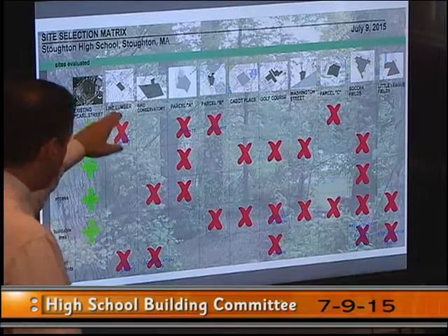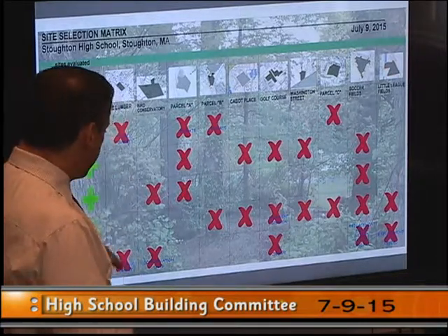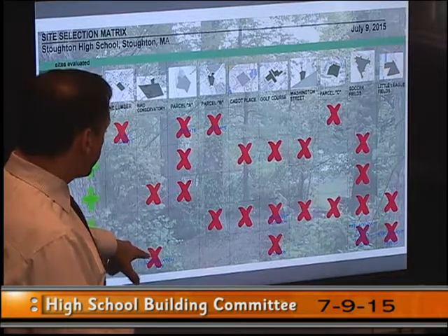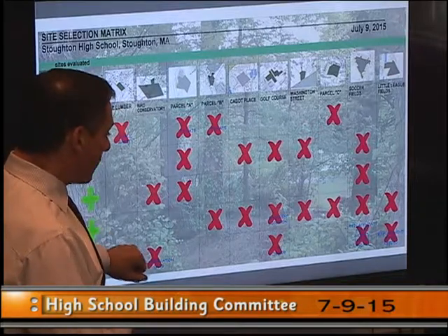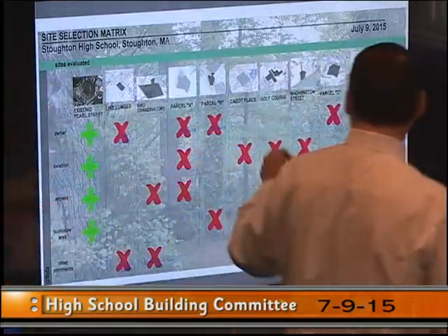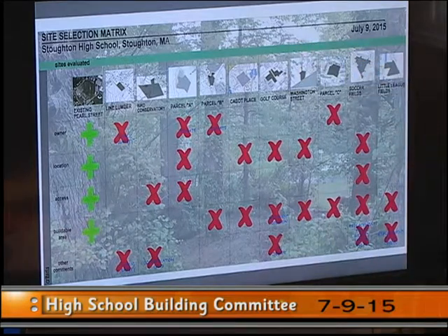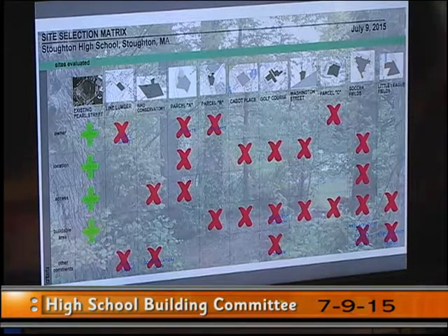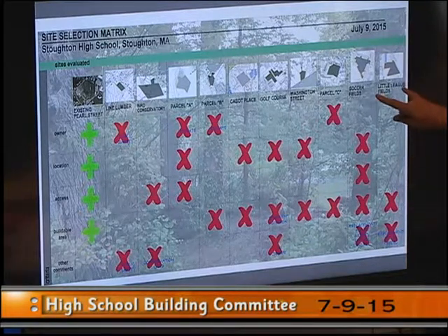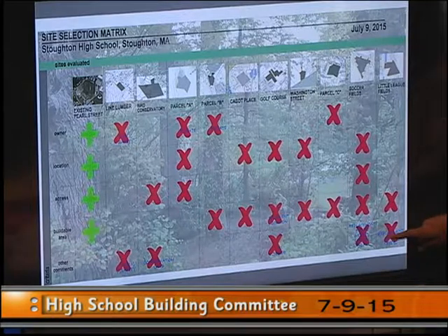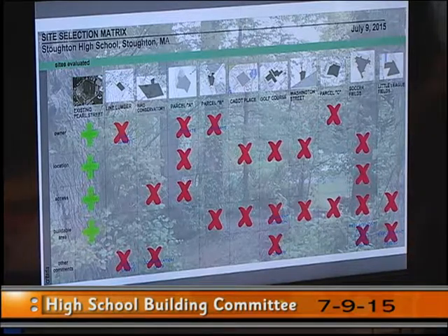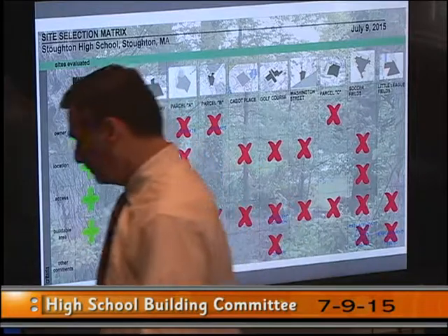The other comments: Line Lumber is earmarked for the public safety facility, as we've discussed. The Bird Street property is conservation land. The golf course has an easement through the property, which makes buildable area a problem. And then the replacement fields and the original use of the soccer field being a landfill, those are some primary negatives about those sites.